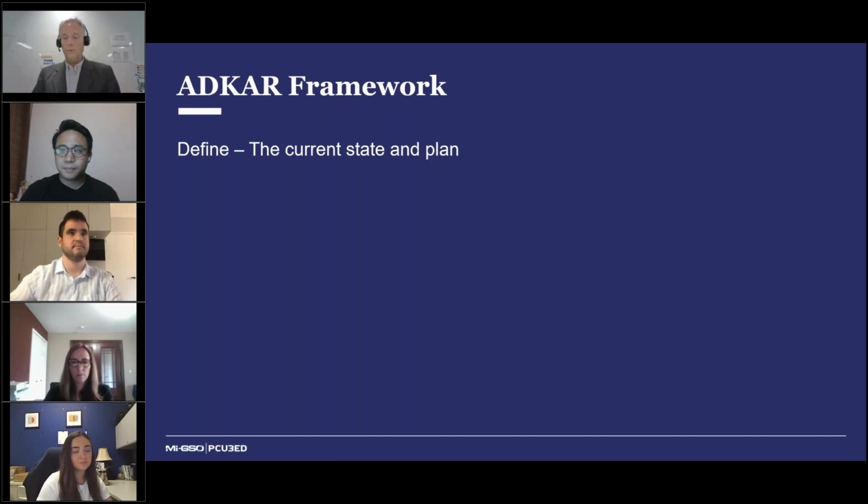We also like, at this point in time, to define and document that vision statement. Hey, where are we trying to go with this solution? And then also identify a pilot. Which group or which team are we going to work with? In this case, working with Sembly AI, we like to pick a pilot team so that we can start out small, take feedback, gather lessons learned, and build the momentum as we move forward throughout the implementation or transformation.